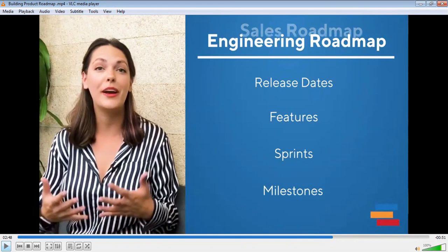see in an attendance management system. I need to have a Philips ID scanner and Sony ID scanners, both. So I need to understand which features are supported by these deployments, and how we can deploy it, let's say if I want to have the Sony Iris scanner deployed in 4 offices. So I need to understand the overall cycle, how much time it takes to procure one Sony Iris scanner, what time it basically gets actually installed on the office door, and that's how I can plan my sprints, my deliverables, and my milestones.